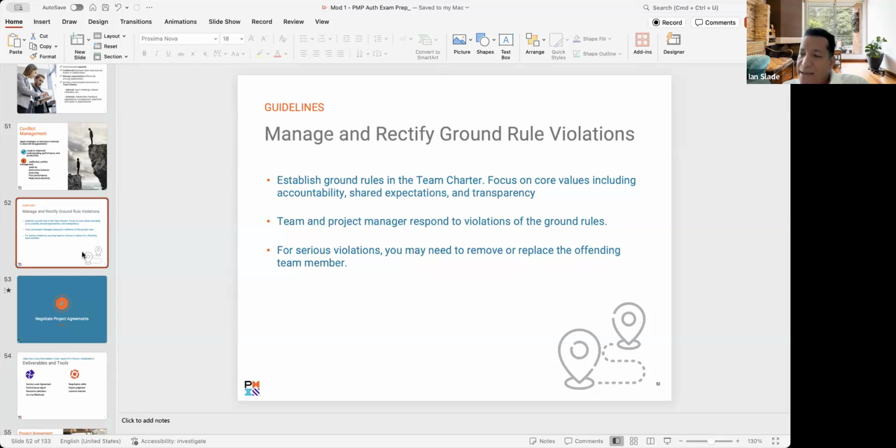And on the Adobe side, I told them, when Stanford calls, I'll make sure that when we call, it's something we've exhausted our internal resources on and don't know the answer to. Will you commit to sending someone to help us out? And they said yes. And we were able to move the project along. So they were stalled for 18 months. We were able to get back on track in 6 weeks.